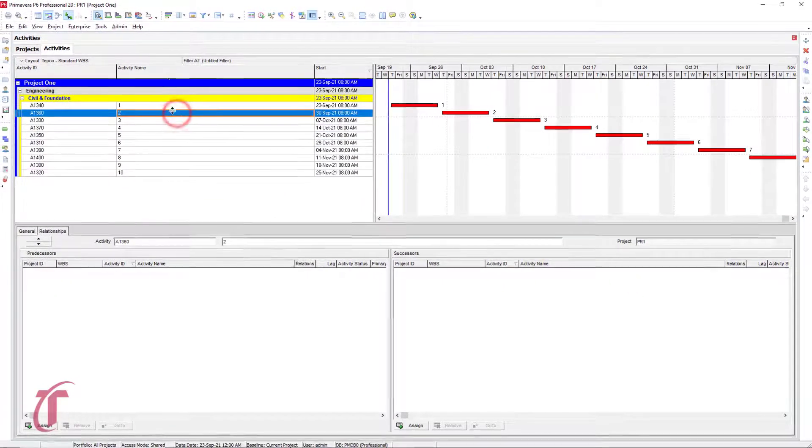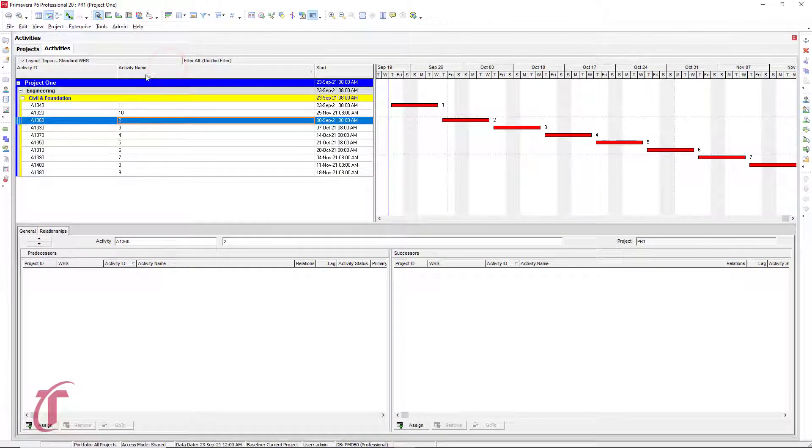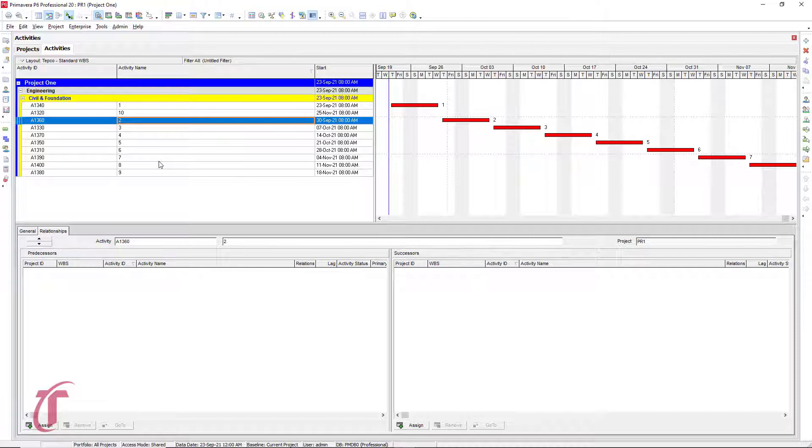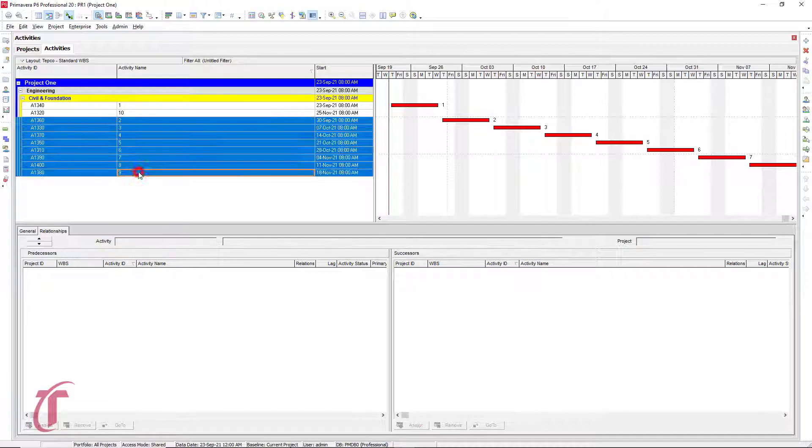So for the next one, let's sort based on activity name and see that it puts some of these in order. And then number 10 is out of order. So what we can do, we're going to use two different methods to link all of this together. Sequentially, we could start with two and then we could link all the way down through nine. So to do that, we can just make sure that we have two highlighted, hold down the shift key, and then select nine at the bottom.